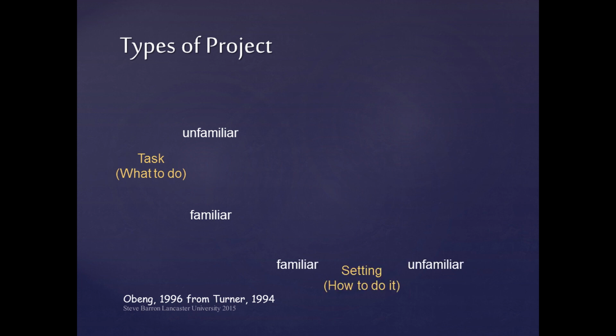The second criterion concerns the setting or solution of the project. This means that we are familiar with or have the ability to solve the challenge set by the project objectives. We know how to do the work needed to complete the project. If we do not have this ability or are unfamiliar with the knowledge and/or skills needed to do the work, then management needs to assist the project team to identify and acquire this knowledge and skill.